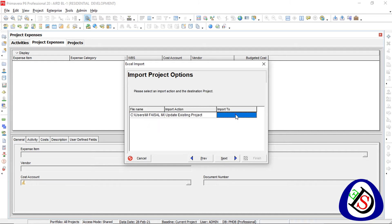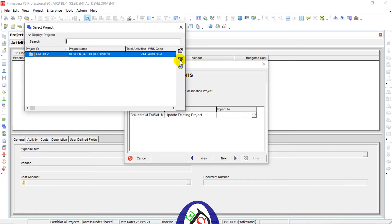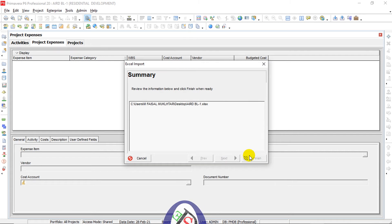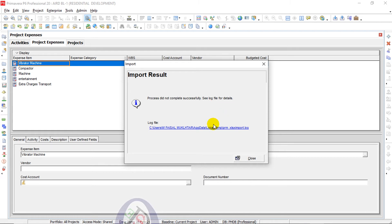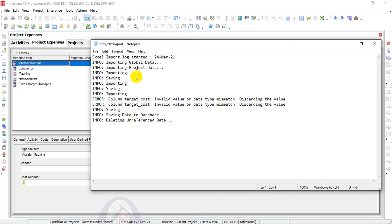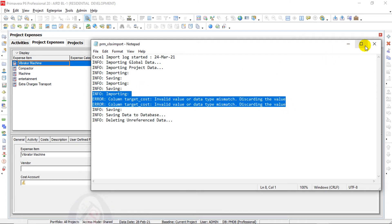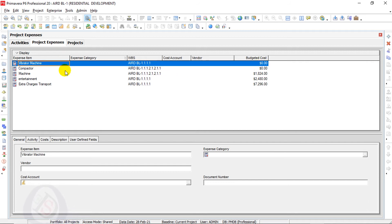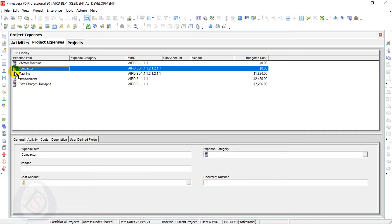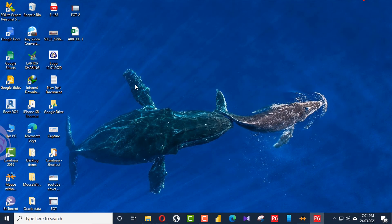I go back to File > Import, select the BL1 file again, and press Finish. I can see five expenses have been added. However, there is a warning: 'Process did not complete successfully — see log file.' Checking the log, some activities were not imported due to database issues. The Compactor and Vibrator Machine expenses were not added — I need to investigate why.